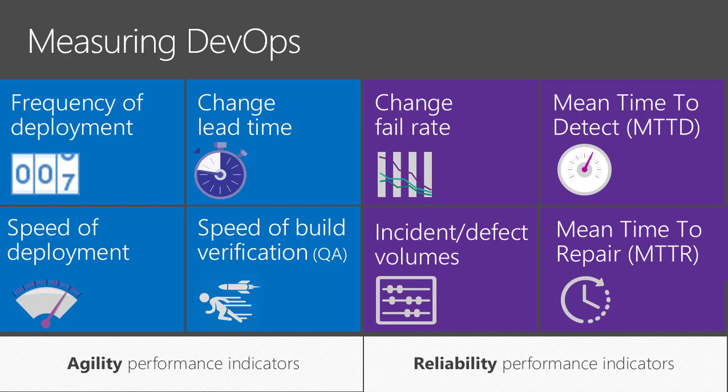For example, let's say that you found that it took a long time to start testing and you want to improve that. What you need to do is just define a KPI for that, for example, time to start testing. And then start measuring the change over time to understand if you improved, if you are the same, or even got worse. The main idea is that we look for the bottleneck and try to define goals to improve that, and put a KPI with measurement and visualize this measurement over time so we can understand the current state and the progress, and whether we are moving or not.